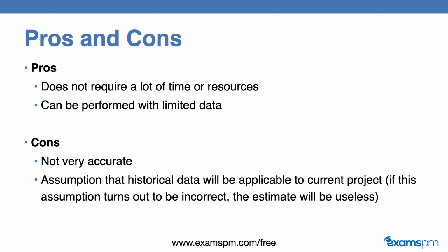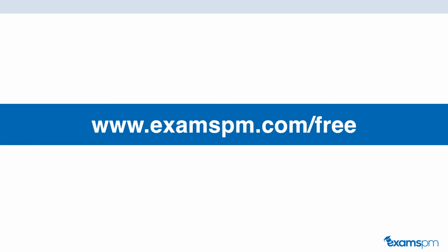Another point to note here is that analogous estimation is usually only used at the activity level. And once you have computed all of your activity cost or duration, then you want to roll this up into the project level to get your overall project budget or project duration.